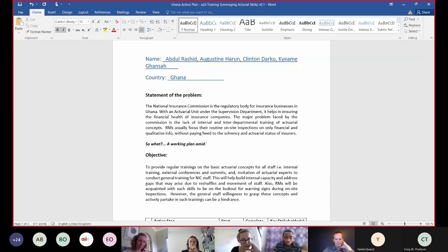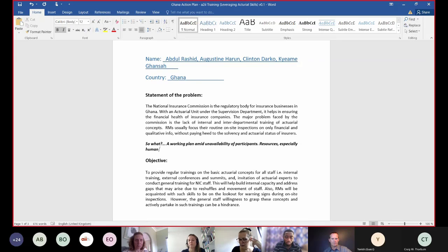Have you considered human resources? I mean, the team of you who will be delivering these trainings, you still have your jobs to do. So how is this going to be compensated? How will you find the time to prepare this, to deliver this, to plan this? So the question of resources should be present at every step of the action and planning steps. The resources could be of financial nature, human resources, or even material, what you will need to make that happen.